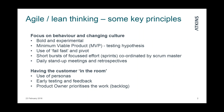A key element of agile is working with short focused bursts called sprints. Each sprint delivers a complete package of work. We break the work down into chunks or sprint backlogs and deliver them in short bursts of very focused activity. Typically these sprints last one week, sometimes two. We use daily stand-up meetings where the whole team involved in a sprint gets together every day, perhaps just for 15 minutes, to quickly update on what they did yesterday, what they plan to do today, and if there are any blockers.